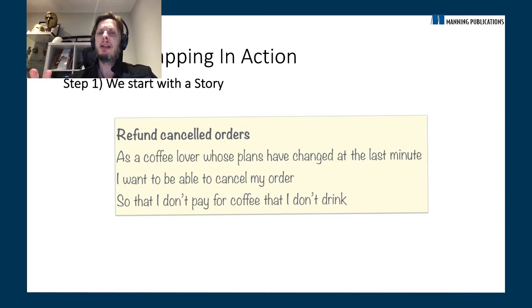A user story can actually be bigger than a user story. What comes into the sprint at this level, we don't actually know the size of it, because this sort of discussion, the Three Amigos, happens before sprint planning. You don't have a clear picture of how big a requirement is until you've talked about it and broken it down into examples and acceptance criteria. Then you can say, okay, this is actually 3 stories, or it's not 1 story, it's 4 stories or whatever. But you don't do that beforehand, you do it afterwards. So that's why I say this is a user story, but it may be a big user story. So I'm going to call it a feature.